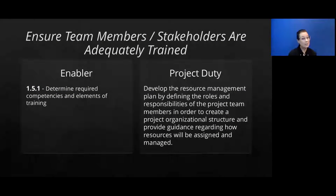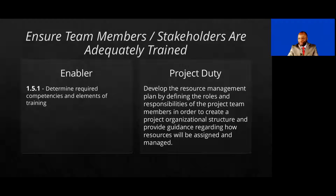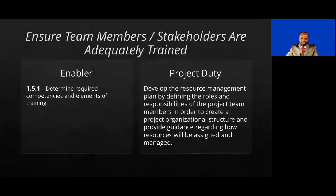We definitely feel comfortable with these enablers — the first is to determine the required competencies and elements of training. So we develop the resource management plan, and in that plan we define the roles and responsibilities of the project team members, in order to create a project organizational structure and provide guidance regarding how resources will be assigned and managed. Not only are we going to assign them, but we are also going to help them get to the level of performance they need to be, which is many a time through training.